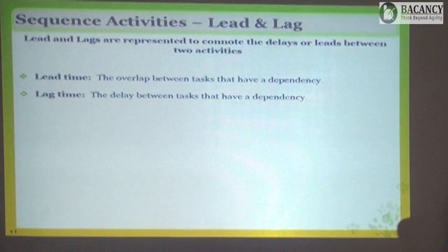Second technique is called project fast tracking. Fast tracking is we will try to insert some amount of overlap between the activities. So we identify this as an activity where we can have some overlap. We are saying that this team doing our requirement gathering will continue to work the way they were supposed to.